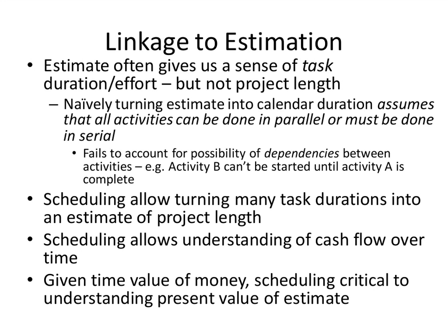Now, why is that a bit of a loaded question? Because the tasks depend on each other. It may be that you can't start certain of these tasks until they're finished, right? It may be that you can't do the integration testing of module A and B until modules A and B are each delivered. You could set it up in a mocking sort of way, but you can't actually do the testing. It may be that you can't do the review, the inspection of the developed code for module C until that code is developed. So there's dependencies.